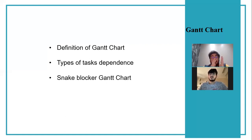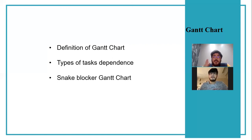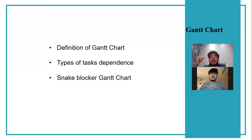The last relationship, which is Start-to-Finish, is sometimes confused. For example, if you have guards at your door and two shifts: the first shift must end when the second shift starts. You cannot finish the first shift without starting the second shift. So this relationship between these tasks is called Start-to-Finish.